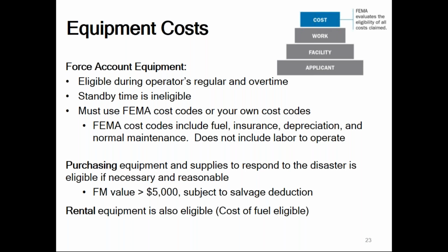If you have purchased equipment, just be aware that when you're finished using that piece of equipment, that equipment could be subject to a salvage deduction, and that deduction would be taken right from your project that you've developed with all your costs associated with it. Rental equipment can also be eligible. Please keep all of your rental invoices and contracts, and be aware that any fuel that needs to go into that rental equipment, you can request reimbursement for that fuel. That's a little bit different than for force account owned equipment.